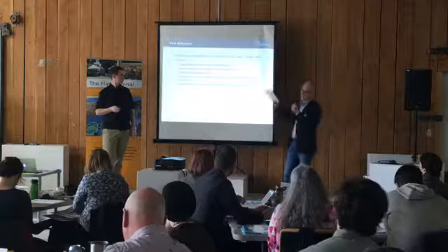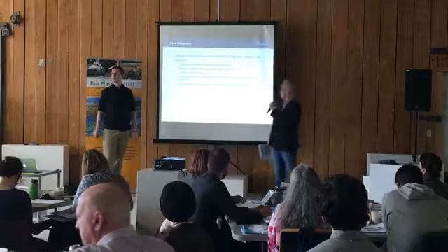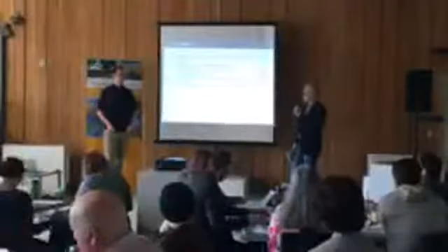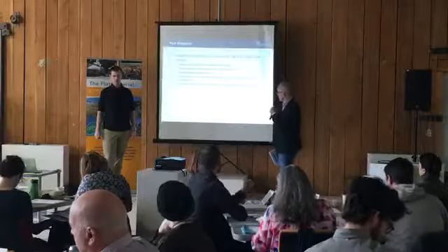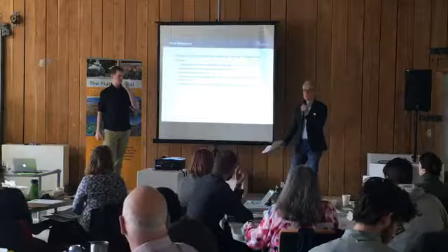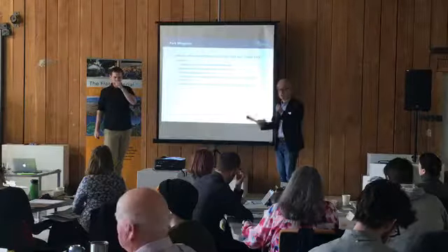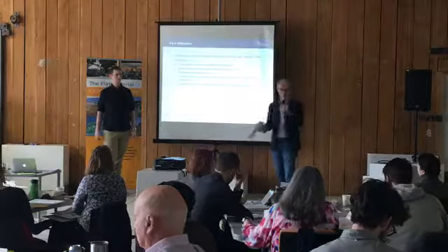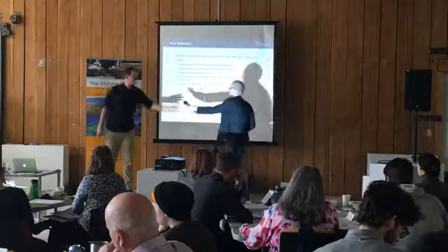And lastly, and the largest piece of the cost of park mitigation in every option, in almost every option, is land acquisition. And that is basically finding land, paying for land that would replace area for area the land lost, and also that the land is capable of providing the same park and recreation services as the land that's been lost. I'll give it back to Jared.